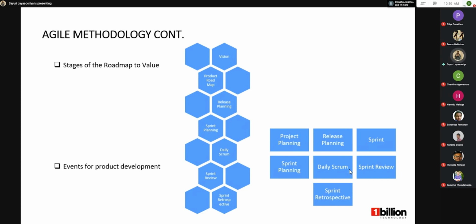That is, the product owner creates a release plan again. The release plan identifies the high-level timetable of how the releases of the working software are going to happen. In an agile project, we'll have many releases, with the highest priority features launching first. A typical release includes 3 to 5 sprints, and we create the release plan at the beginning of each release.